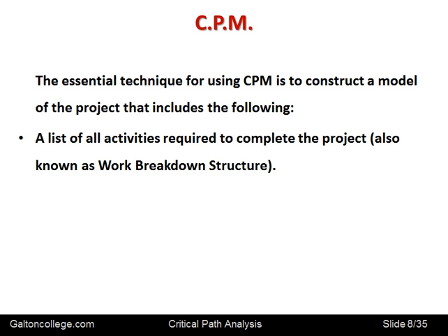So if it's an engineering product, then which procedures are necessary before the next set of procedures. The holes must be drilled out before the nut or the bolt or whatever can be inserted into it. So it's essential that one activity comes before another, and that is specified. So what this technique forces management to do is to itemize all of the steps in the project, list out all the activities, so that an optimum route, a best route, can be worked out to complete the project.